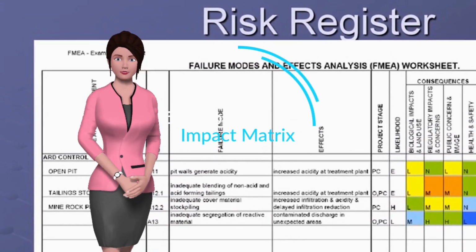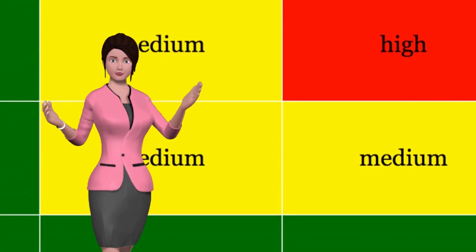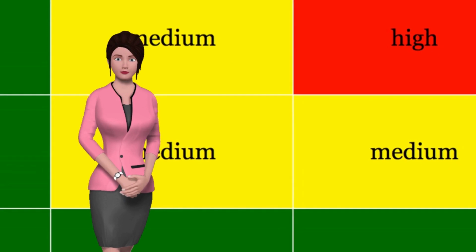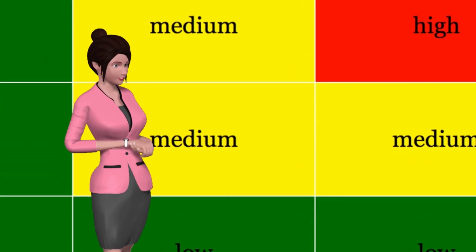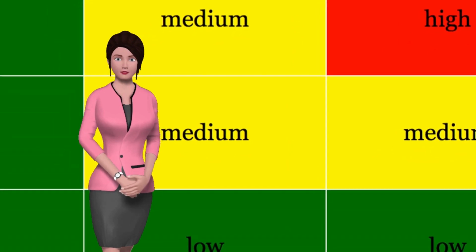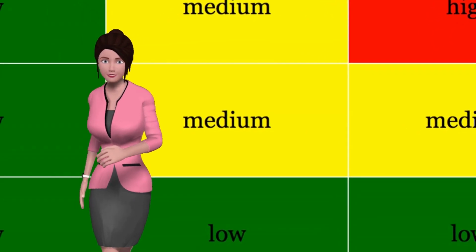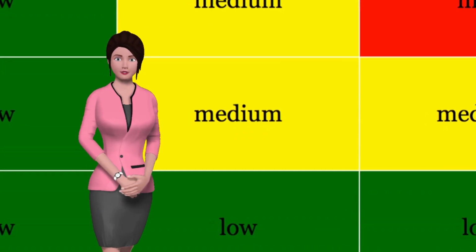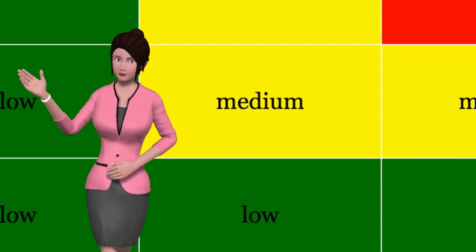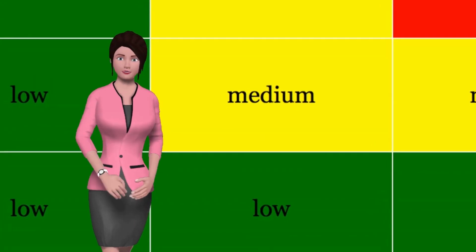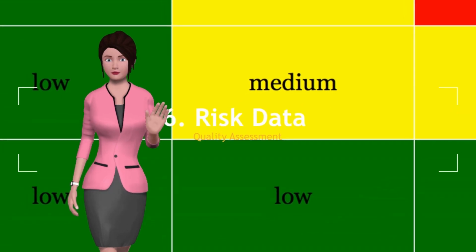5. Probability and impact matrix. Another tool for project managers is the probability and impact matrix. It helps prioritize risk, which is important, as you don't want to waste time chasing a small risk and exhaust your resources. This technique combines the probability and impact scores of individual risks and then ranks them in terms of their severity. This way each risk is understood in context to the larger project, so if one does occur, there's a plan in place to respond or not.